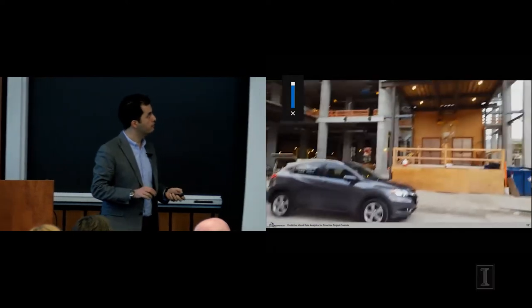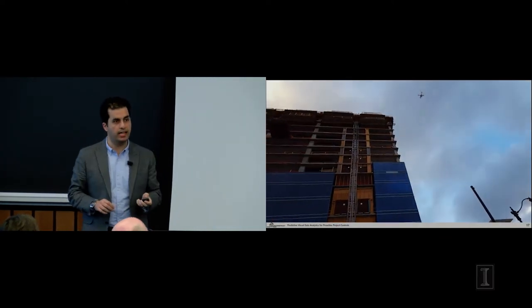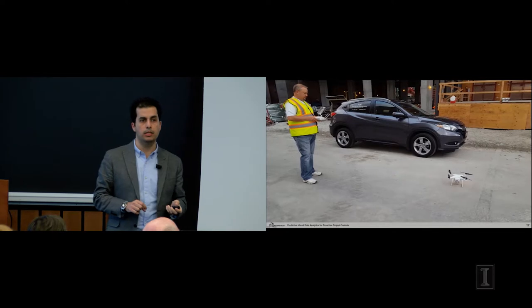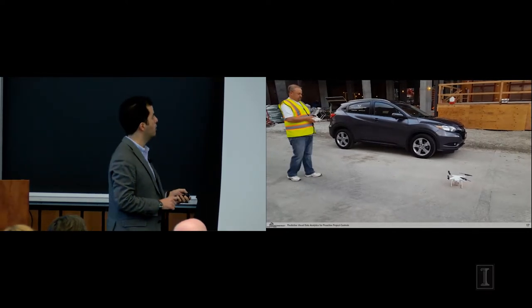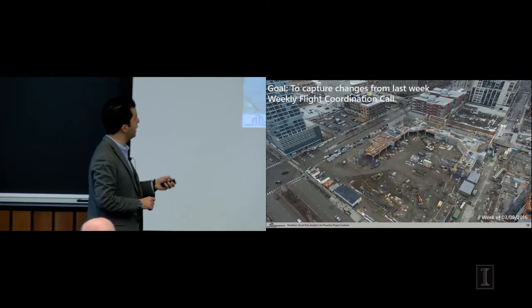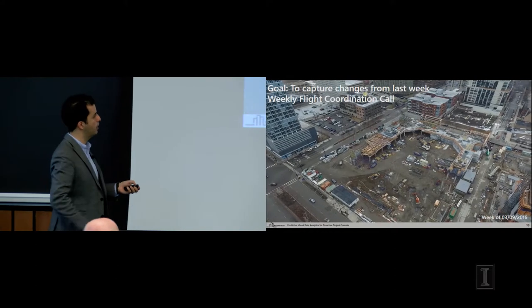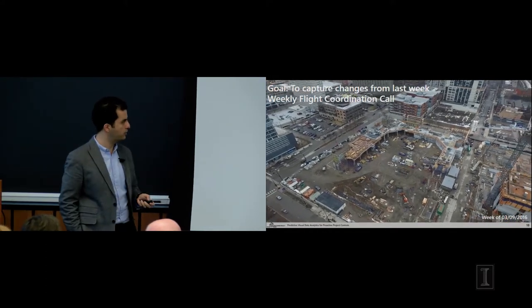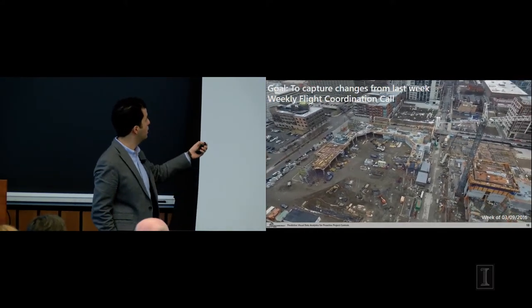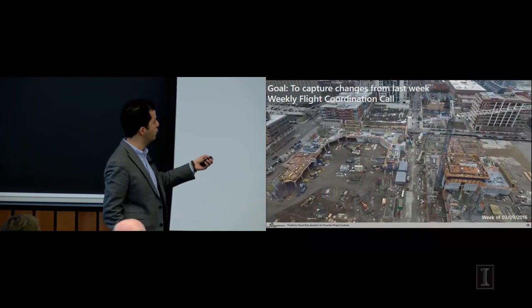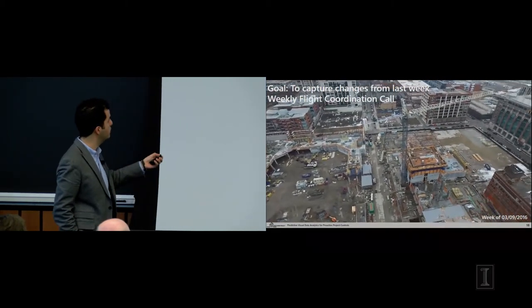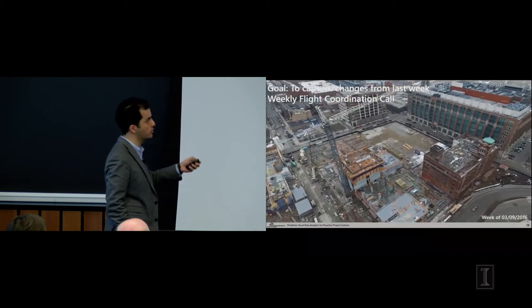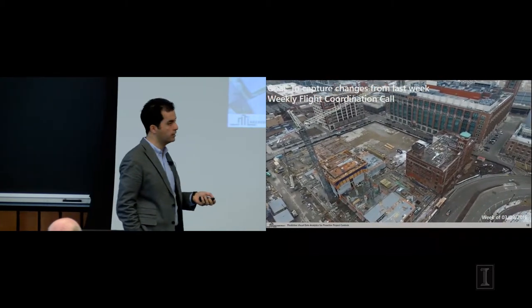This was typically conducted Saturday mornings, close to 6 a.m., for a little bit over a year, where our drone operator was showing up and capturing these types of visual shots for us. So this is last March, about a year ago. The goal was to make sure that when he's flying over the job site, given the plan that we've provided to him, he can capture changes from the last time he's been on the site.